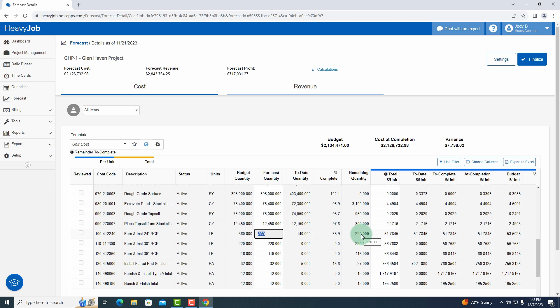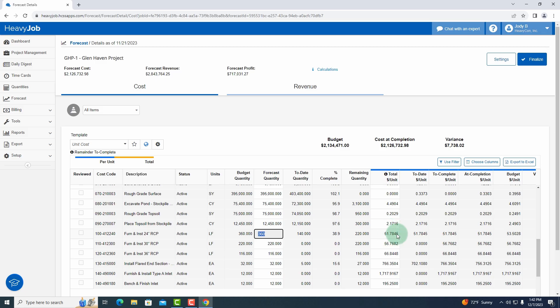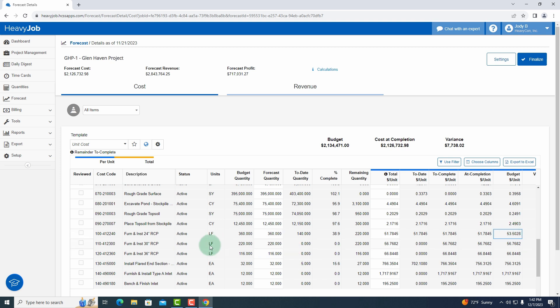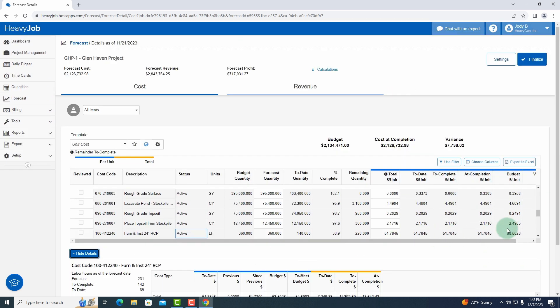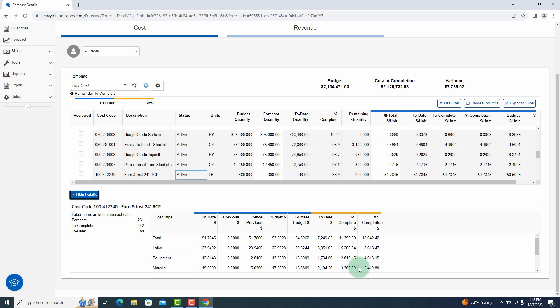So the next step is hey, well what is my cost? So I know my quantities now and here's my cost. The total dollar per unit that I am forecasting is $51.78. I want to look at a couple of other things here. You can see my budgeted dollars per unit is $53, but maybe I want to see more detail about this particular cost code. So I'm just going to scroll down and say show details. And now I can see the to date values, previous means since previous forecast, my budget, my to meet budget, and then it shows me the to date totals, to complete, and at completion. So I can see some more information here about that cost code.